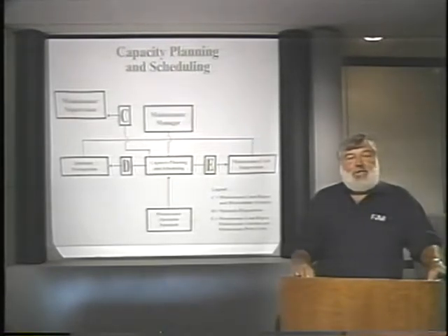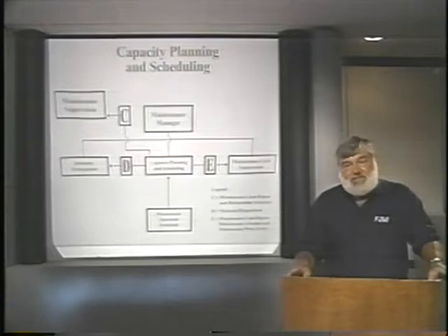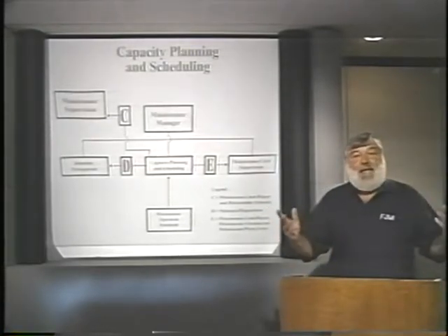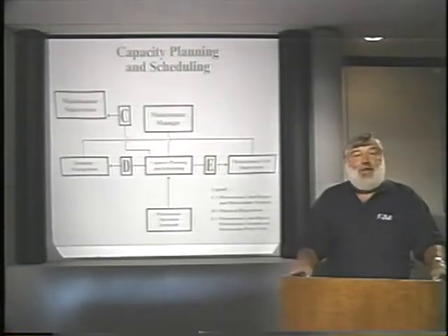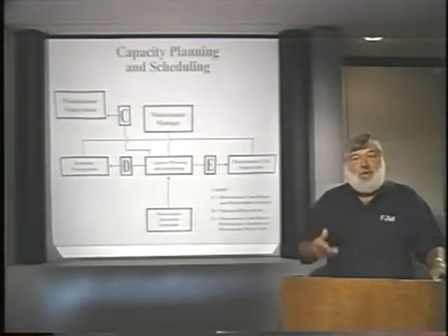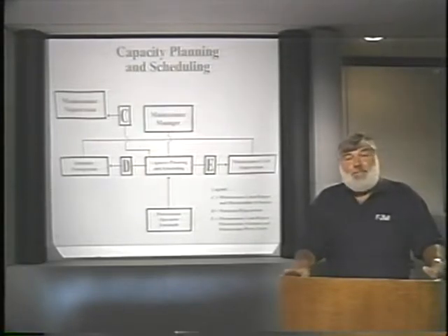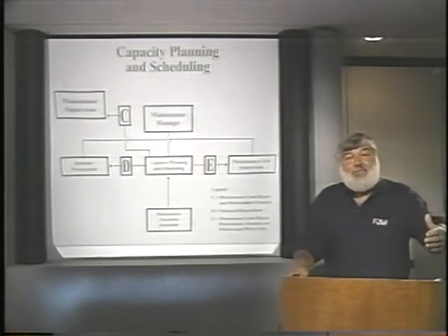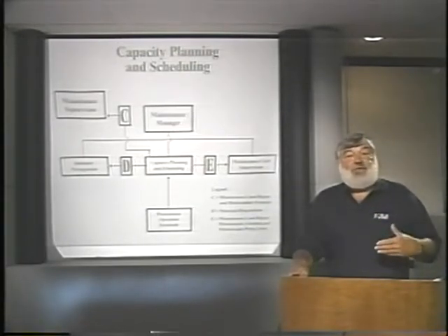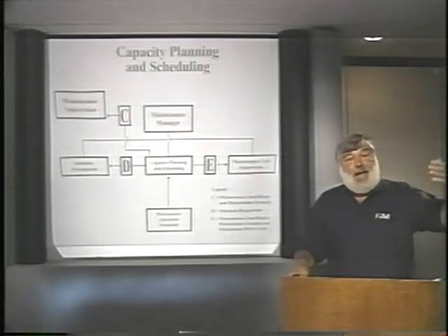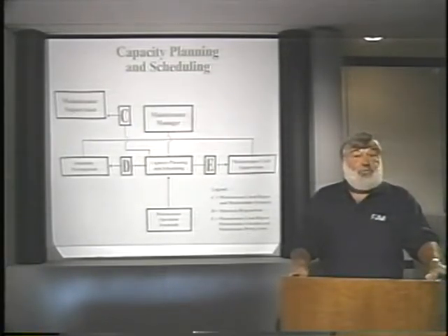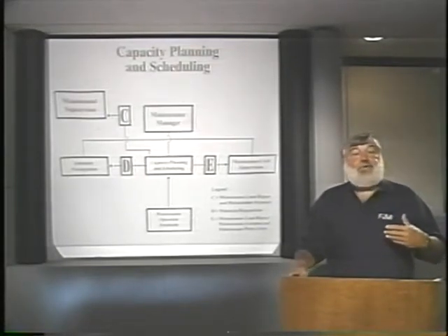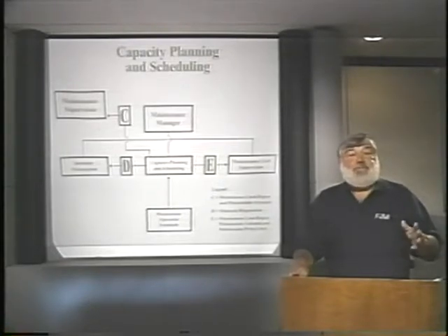I advise you to start generating these operating standards. You could call them work order standards or craft operation standards. I don't care what you call it, but be consistent. Start to record the standards. One easy standard to start developing is the travel time for a craft person from, let's say, the maintenance shop out to a particular department or to a particular machine. The travel time back to the maintenance organization.